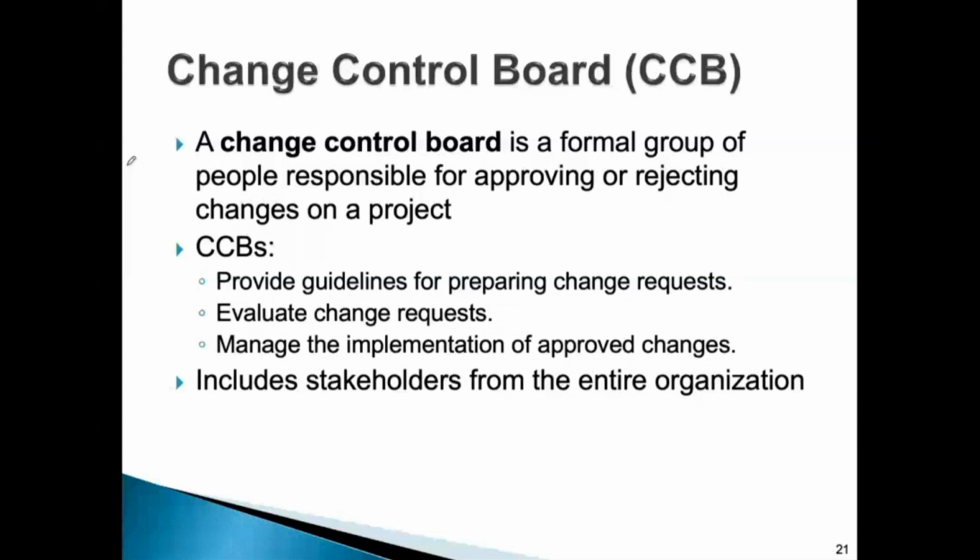This board will give you a specific procedure to follow in order to ask for a change. They will evaluate the changes, and then approve or reject them. They also manage the implementation of the approved changes. If they approve a change, they will also ask you to provide a progress or status report. What happened to this change? Did you implement it? What was the result from implementing it? And they will follow up with you.